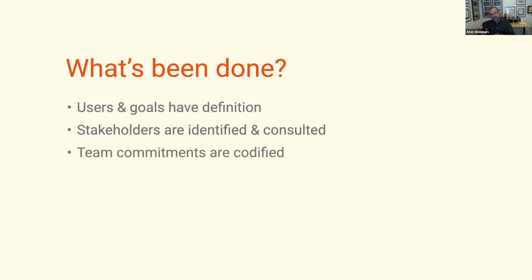And of course, you want the team commitments, right? I'm going to spend 50% of my time on this, and one of my developers is going to spend 80% of their time on this. And leadership, I expect 1 or 2 hours from you throughout the discovery period. This is really helpful to make sure that you are getting those commitments early. Knowing how hard it is to schedule leadership and get them in the room, getting this outlined before kickoff will help you maintain your timeline and velocity on the project.